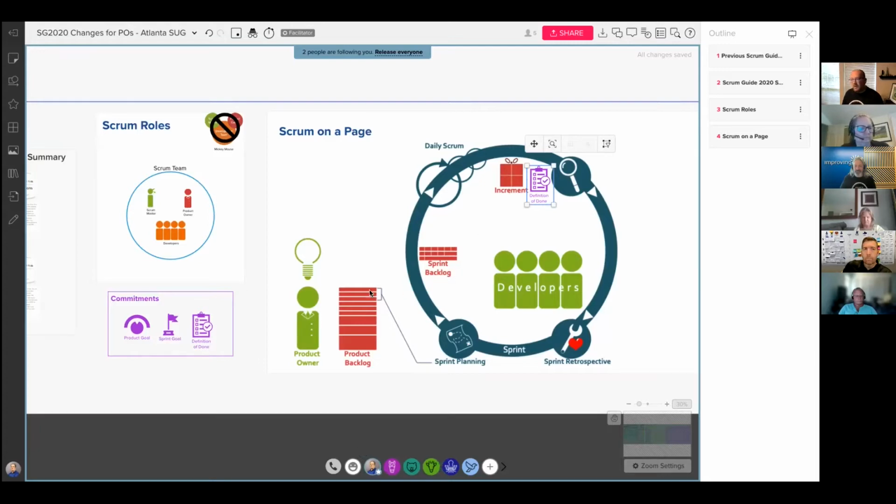So if you can get any one of these to done, you've got an increment, and hopefully sooner in the sprint, right? So you're going through the sprint, getting them to done throughout the sprint. So you get an increment early, and then it builds from there. So the definition of done, what is that? It's the commitment, right? This is the commitment that the Scrum team makes, that we're not going to skip this. We have a certain definition of quality and what done is, and we're not going to call something done when it isn't. That is a commitment.